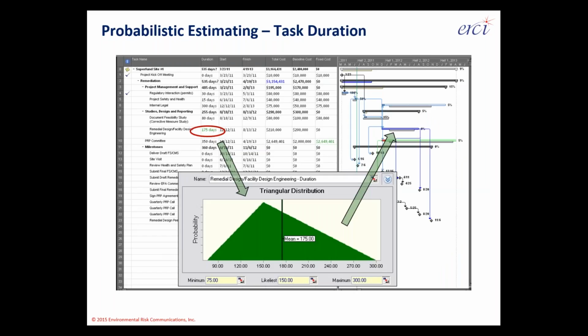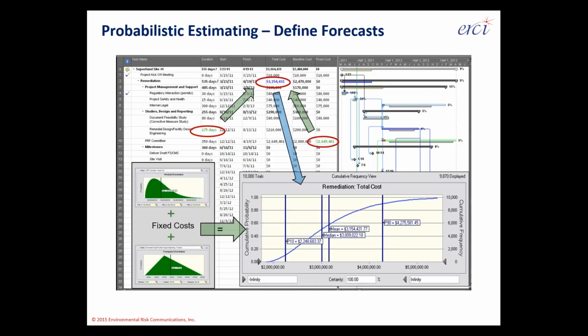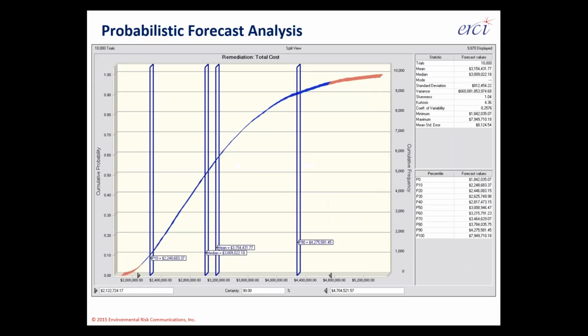If you're working outside of Microsoft Excel and instead working in Microsoft Project, good news is you can also apply this there. Or if you work with @Risk, you can apply that to Primavera, I believe. At any rate, you can apply uncertainty and ranging to individual timing or cost constraints and see what that in turn has an impact on in terms of cost and schedule implementation. Again, keep in mind these are just quick views for prototype displays for your benefit, so I don't have any live iterations that I want to share with you today.